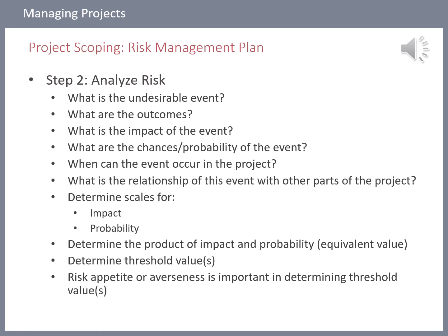So in the process of analysis, we say, let's determine the size of the risk by combining two parts to risk. And that is the impact and the probability. Impact means the size of the bad thing that will happen to the project. And again, we talk about impact, we say impact on what? Our scope, or our performance, or our quality, and/or our schedule, and/or the cost of the project. So that's always where you will scale that. You'll look at some scale in terms of that.